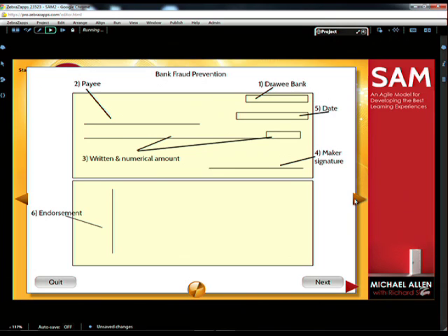So as we're talking, this is the first round prototype. And so our design phase is prototypes: show it to the team, have them discuss it, iterate, add in the things that we've talked about, and then move forward until we all decide this is a good design, and then continue along. So the first thing we asked was, what do these people need to be able to do when they're done? And all they said was, look at a check, look for 6 components, flip it over, make sure it's endorsed properly, and say yes or no.